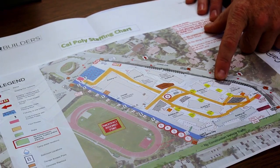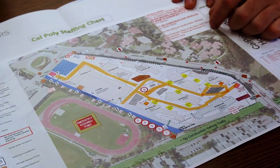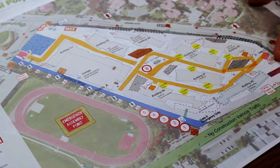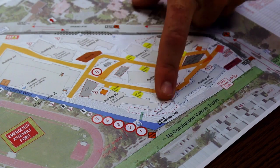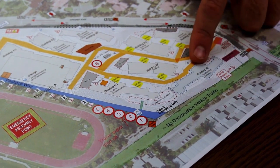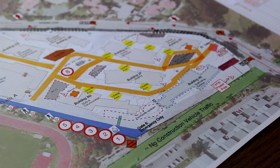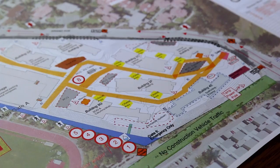We show WCG, which is our laydown area for all our formwork, so you can get an aerial shot of that. Crane pad areas, washout locations, and debris boxes are signified. It's small, but we're starting to show where we put tent bathrooms when we start plaster. 4E is being built out, so we show the exterior scaffolding there and where the plaster silo will be. As people come in with deliveries asking where they can lay down stuff, we say, don't put it there, because I know a silo is going to be out there at the end of the day.